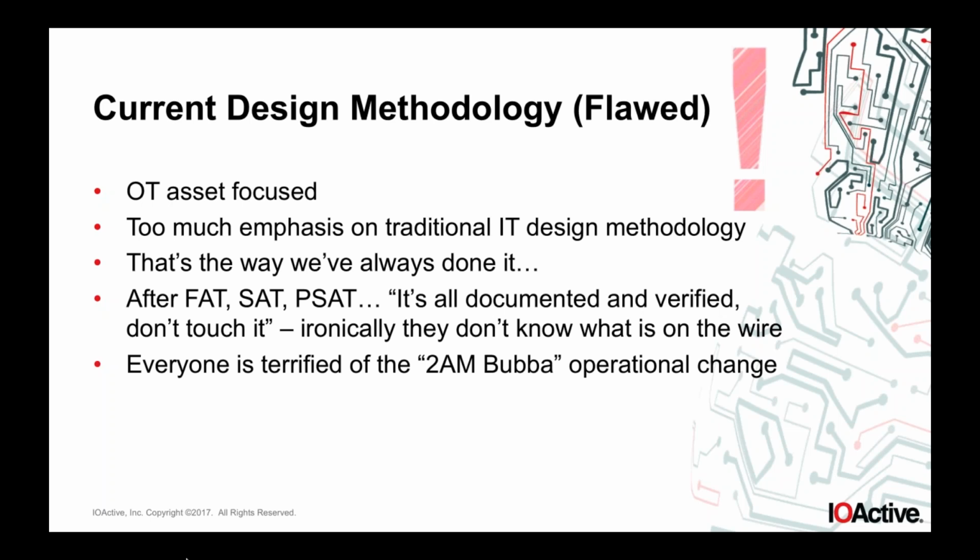And so we see this happen a lot in the OT space as well. People build everything, they play around with it until it all works, and they go, okay, well now that's the baseline. So they do the factory acceptance test, the site acceptance test, the pre-startup acceptance test, and then they start the process. And once it's up and running, they're like, oh, well, we had to turn all that security stuff off while we were doing this, and we didn't patch anything, but now we're operational, so we really can't do anything about it.